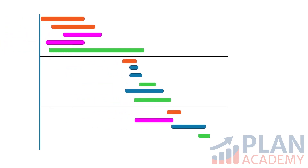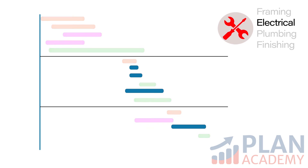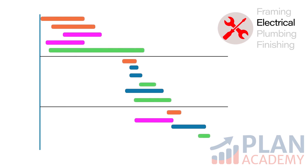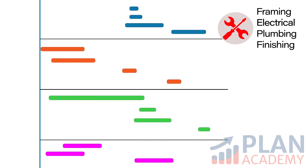What about filtering? You can build customized filters to help you focus on activities that meet all sorts of criteria. It's easy to filter activities based on any of the activity codes you've added to your schedule. And don't forget, there's also grouping. You can group work based on your activity coding — for example, you can group all of the electrical work together, pulling from across the entire project.